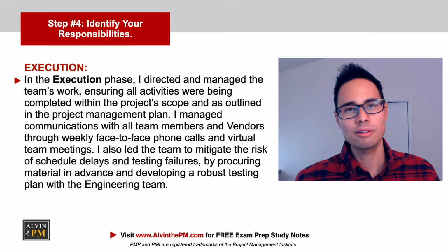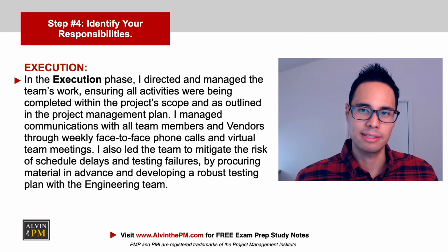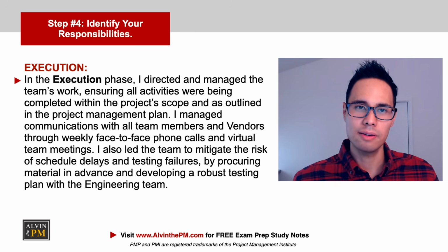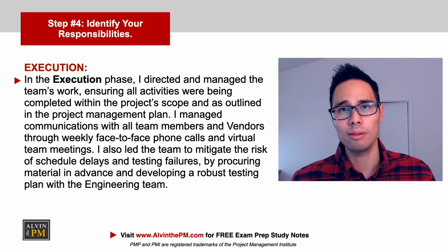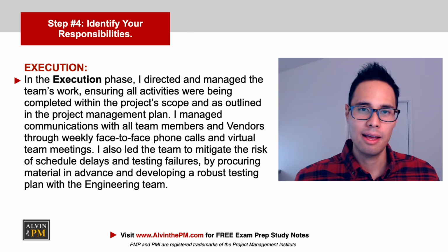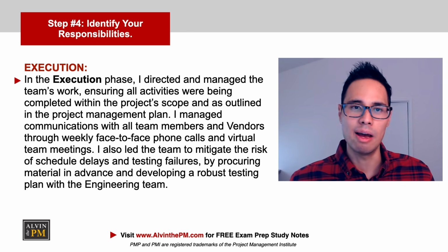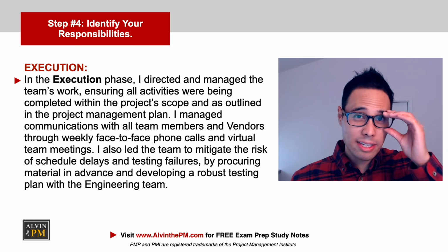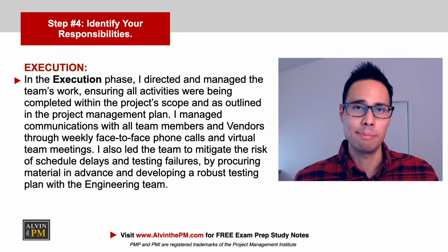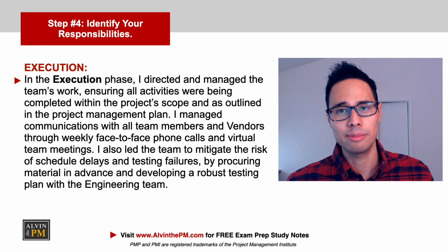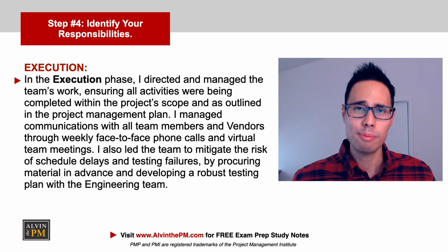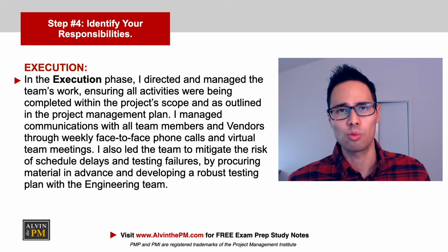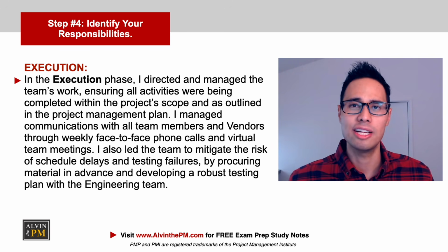Now onto the execution phase. In the execution phase, I directed and managed the team's work, ensuring that all activities were being completed within the project scope and as outlined in the project management plan. I managed communications with all team members and vendors through weekly face-to-face phone calls and virtual team meetings. I also led the team to mitigate the risk of schedule delays and testing failures by procuring material in advance and developing a robust testing plan with the engineering team.